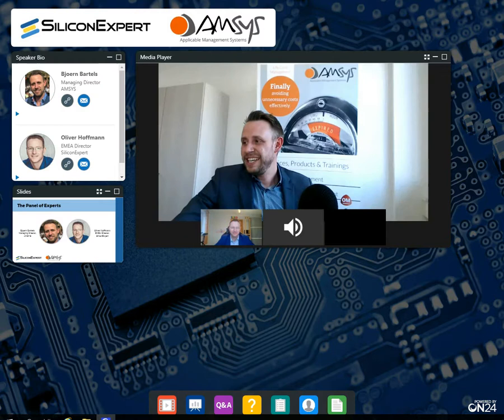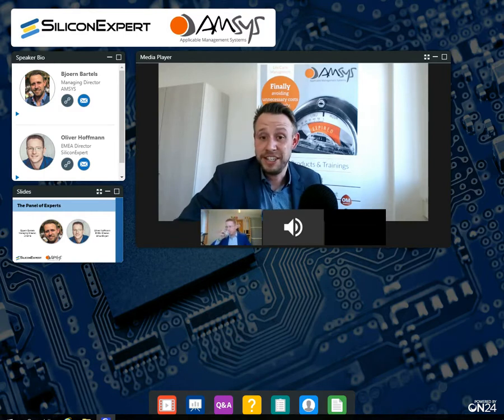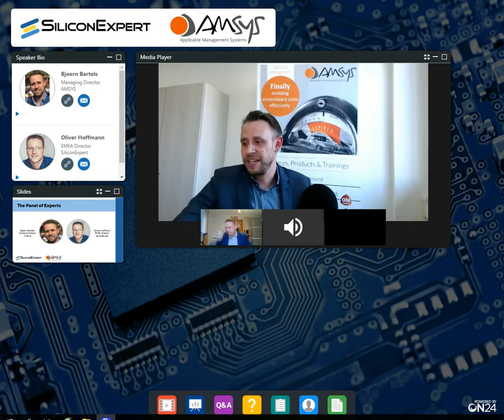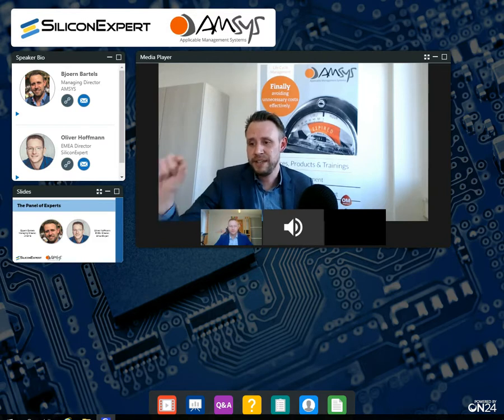That's actually choosing the right formula. And I've seen so many companies doing it wrong. Especially when it comes to, for example, last time buy decisions or stocking information, they usually go down to the piece part price of a component and compare it with engineering effort. But that's not the right importance, because you would have eventually used the part anyhow. So pricing of the item